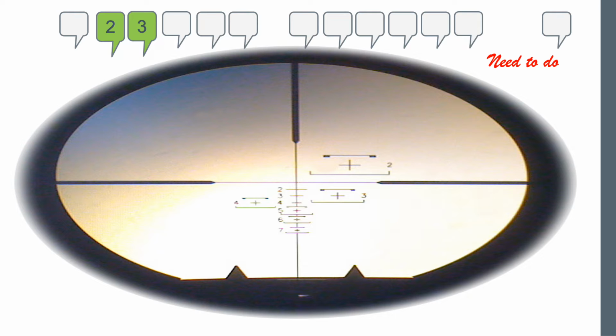Well, what do we need to do? First and foremost, we need to get the tenant out of the building, because our project really involves 3 very important things. One is we're going to move from one building to another building. We're going to move people, 16 people and 3 pieces of equipment. And we're going to be compliant by November the 3rd, because if we're not compliant by November the 3rd, there is a penalty. So that's what the project's all about.